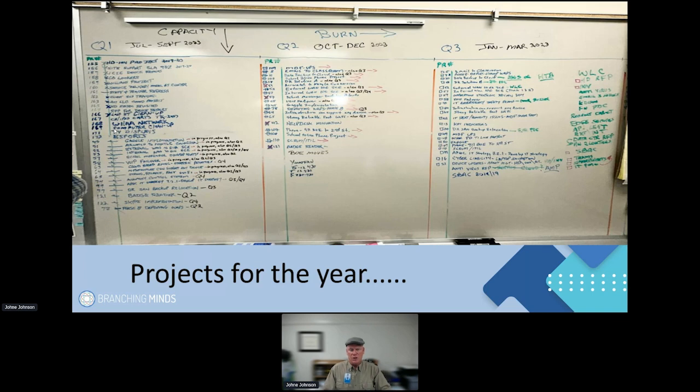I started putting this together back in 2017, and I've been doing it ever since. I break this down into the four quarters of the year. I look at what capacity I can do in the first quarter, and as I start saturating that and get too many things in, I look at what I'm going to do with the rest of the stuff they're throwing at me. I can do several things. I can request more capacity, whether that's in people or in resources.